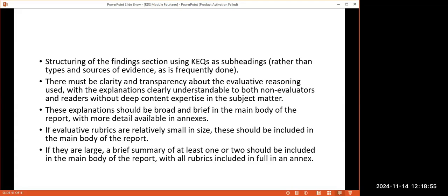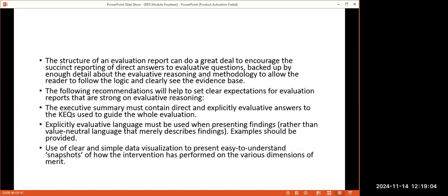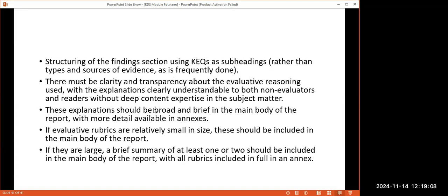So in structuring the findings, because after the executive summary, the introduction, and other areas, there's this findings section, which I think for you, Daniel, was the chapter on findings and discussions of the results. So we have the same, but then the findings are presented according to the objectives, right? According to the key evaluation questions. So if you had three key evaluation questions, then your findings are provided according to what you found out at each of those levels of questioning.